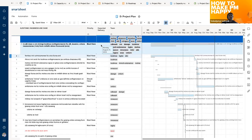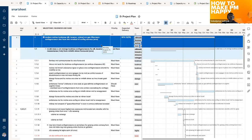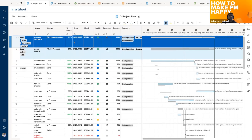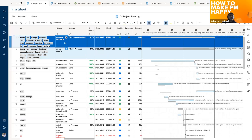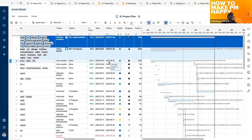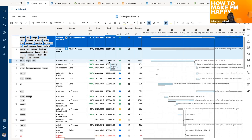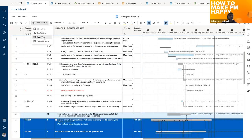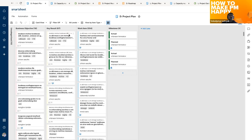There's some automation provided by Smartsheet that helps you get notified and stay up to date regarding such updates. The person assigned as the owner of a particular business objective will immediately get a notification that the finish date was changed. Once this happens, the responsible person is aware that the delivery date just moved half a year ahead — something that requires their attention to understand what happened, whether it's a human mistake or something that needs to be communicated with the client.